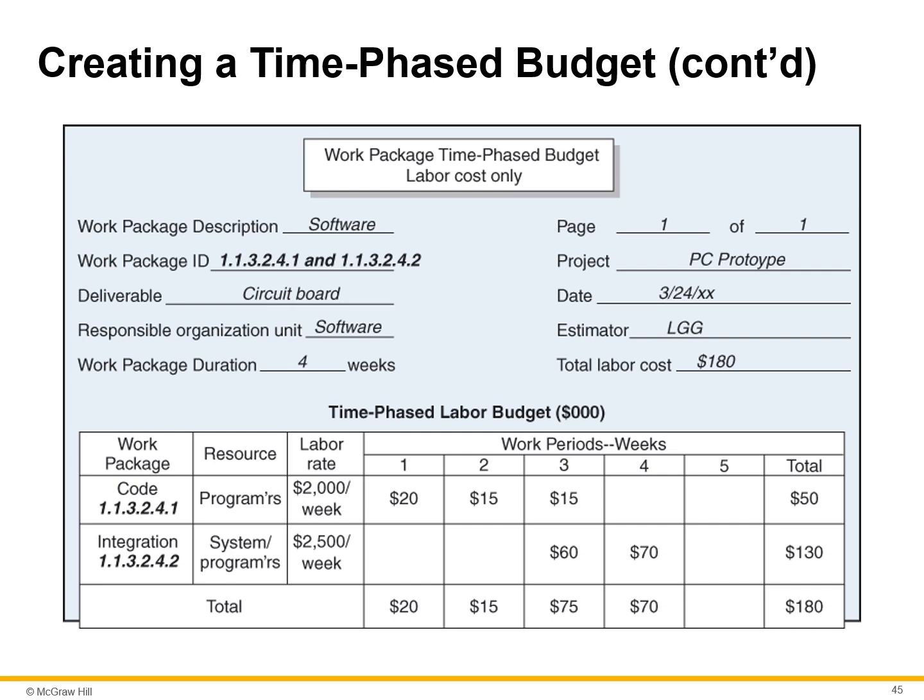The second, 113242, is sequenced over weeks 3 and 4. The activity duration is 4 weeks. When the activity is placed in the schedule, the costs are distributed starting with the schedule start, 20,000, 15,000, 75,000,